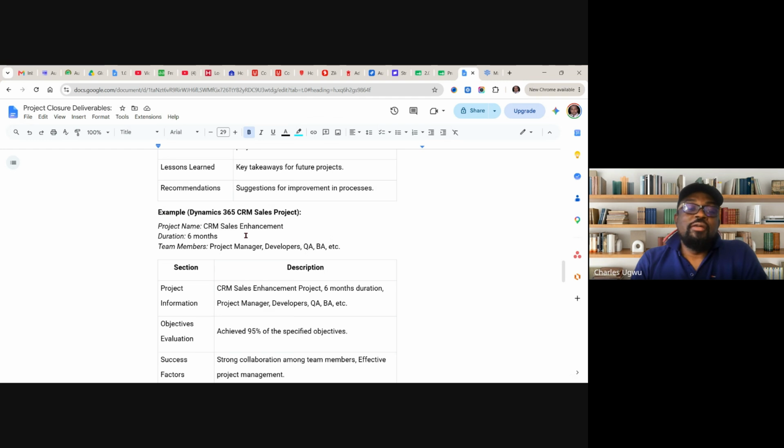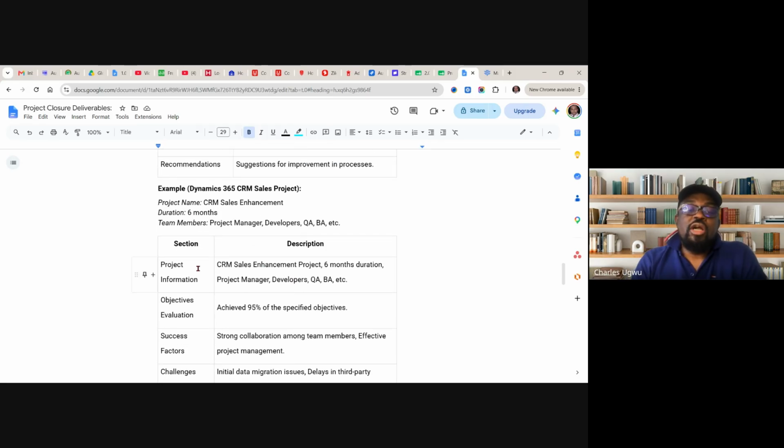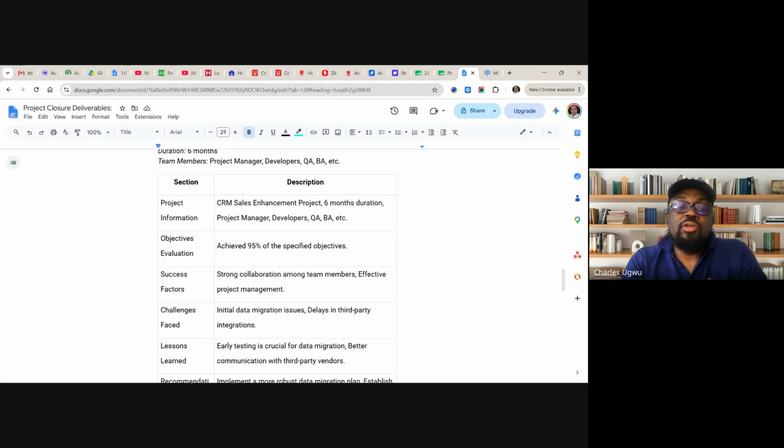And you come down here, this is the live lesson learned, which will apply to these Dynamics 365 CRM cells. So you see here, this is the project information. You capture the project information, then you capture the name, project duration, project manager. These are team members, developer, QA, BA. You need to capture all the team members in this project. You must capture all of them. Whether you like them or you don't like them, just capture them, BAs, QA, all of them.